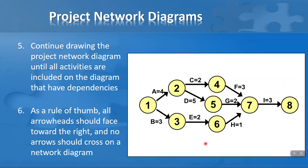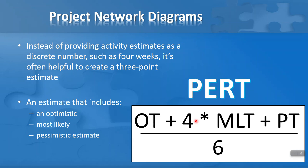We have several numbers on our arrows indicating duration. We could have accurate estimates of each activity, but instead of providing a discrete number, it's often helpful to create a three-point estimate using the PERT weighted average. PERT stands for Program Evaluation Review Technique. The formula takes into account the optimistic time (OT), the most likely time (MLT), and the pessimistic estimate (PT) for an activity, giving us a weighted average. This is very useful when there's disagreement on the duration of an activity. More on this in a later lesson.